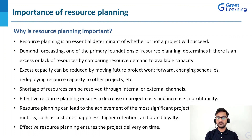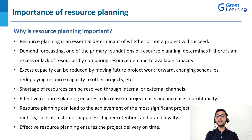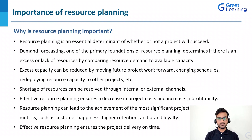If there is a shortage of resources, it can be resolved through internal or external channels. For example, if eight members are required but we have ten, the two excess members can be utilized in some other place in the same project or another department, maintaining productivity and maximizing profitability. First, compare demand with available resources, find out whether we have resources in access or in lack, and based upon that, make strategies to ensure the process is very smooth.